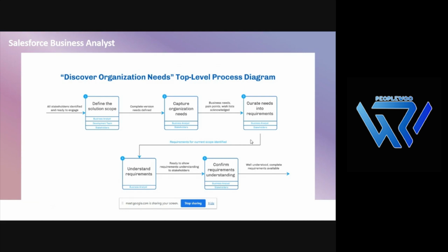They will review it and give you a confirmation. Once you get that confirmation, you start working on the PBIs or user stories, meaning this particular story will help you implement a feature. As I said, it's about client onboarding. So this feature should have a button right here. Upon the click of this button, the user should get a pop-up screen. That screen should have this many fields, the data type of this field is this, and the user should be able to key in the data. And upon the click of save, a new entry needs to be created. This is how you write a user story.